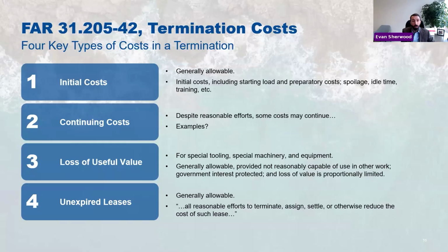Sure, great. What can you do to get out of it or reduce your costs? There's no early exit provision? Okay. Can you sublet it? Can you find a sublessor to come in? Maybe you can, maybe you can't. You'll want to show what efforts you took to do that. And if at the end of the day, after reasonable efforts, you can't get a sublessor and you can't get out of it, I think you'd be decently well situated to claim that year's worth of lease costs.